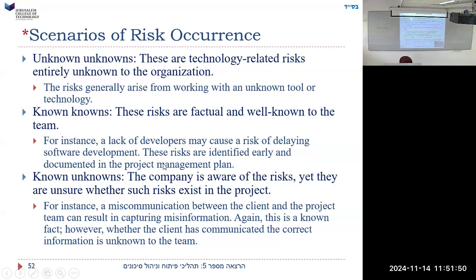In other words, we may even put in our contract that we will finish at this time if we can get suitable workers and the visas are not canceled by the new president. And then we know about this risk. We know that our workers might disappear.